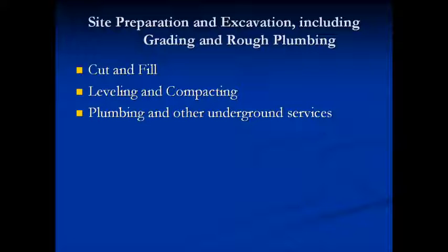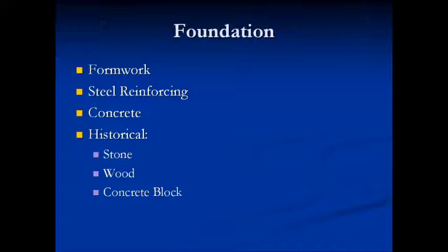These are things required related to site preparation. For the foundation, you'd have to have formwork in place and steel reinforcing, usually for most construction. After the formwork and steel reinforcing is in place, you would be pouring the foundation, usually in concrete. This is standard in a lot of construction, although there are differences that can happen based on your circumstances.